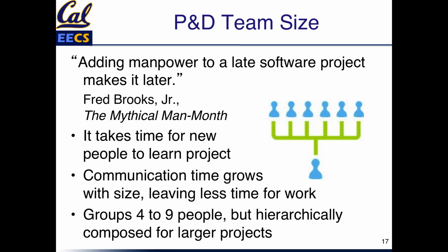These teams, the plan and document methods, tend to get bigger primarily through expansion. And another famous thing from Fred Brooks, from The Mythical Man-Month, is that adding manpower to a late project makes it later. So this is a thing he observed, right? Oh, we're behind. What are we going to do? We're going to add people. That's going to make it worse.